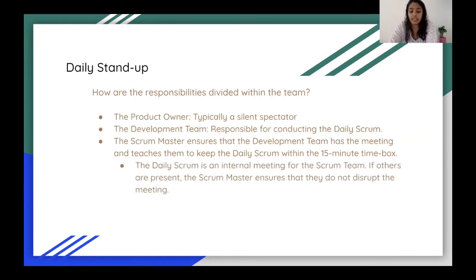Now, there is one thing, although the daily Scrum is a team meeting, it is still an open invite. So you can have stakeholders or any of your supervisors, etc. Anybody can join this meeting, with the note that they can just participate as an audience. They cannot use this meeting as a place to ask questions. And that falls on the shoulders of the Scrum Master to ensure that that does not happen.